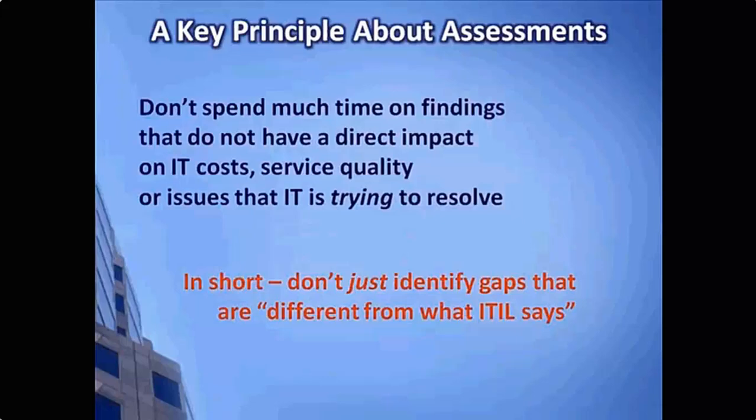Again, a key principle about the assessments. We want to focus our time and focus our findings and analysis in areas that relate directly to the vision that we created in step one of our implementation effort, the ITSM visioning step. Don't spend too much time on findings that do not have a direct impact on IT costs. In short, don't just come up with a list of gaps that are, and I use this in quotes, different from what ITIL says, in terms of what the book says versus what you may actually be doing.